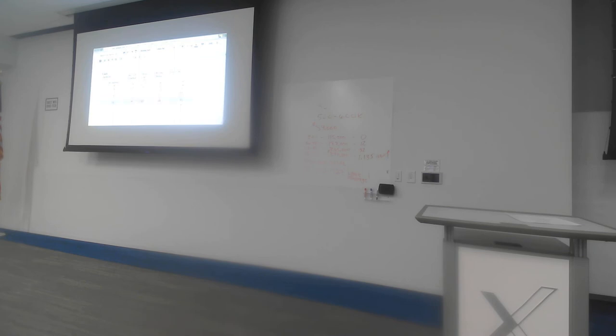Bringing the overall project duration in at 14 days with a total cost to me, the project manager, of €95. And again, just to write that out, optimum schedule at a total cost of €95 for 14 days in duration. And this was achieved by crashing I by 1 day, C by 1 day, E, now just be careful here, we're going for this option here, so at that stage we had only crashed E by 3 days. And finally, J by 1 day.